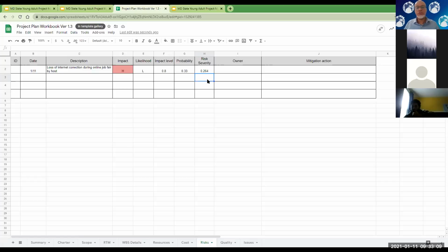The point is you have two ways to assess your risks. One is qualitative, these two columns, D and E. One is quantitative, F and G. And if you do quantitative, you can actually rank them. Most people on most projects just do D and E. Large projects that are very expensive do F, G, and H. But you'll find most projects just focus on qualitative measures. All right, let's move on unless there's another question. Anyone else have any other questions?